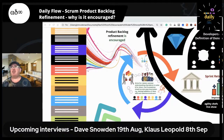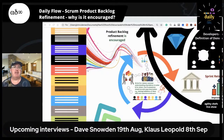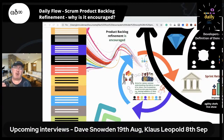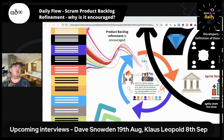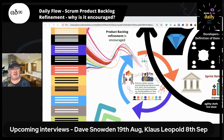There are a lot of similarities. In addition, in TameFlow and 20th-century Kanban, there's the concept of full kitting. What it essentially means is lining up all your ducks: do we really understand this work, do we have dependencies on other people, have we set expectations with those people? And full kitting also asks: I know you asked for this four months ago, but what problem are you trying to solve and what opportunity are you trying to avail of? I see a lot of teams start work they know is going to get blocked immediately because they're sending it to a supplier, agency, or third party, and they haven't lined up their ducks. Full kitting addresses that.